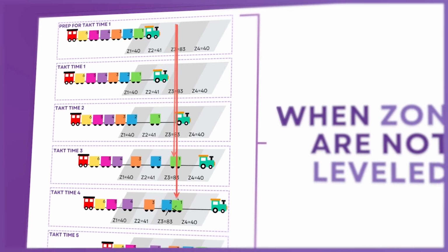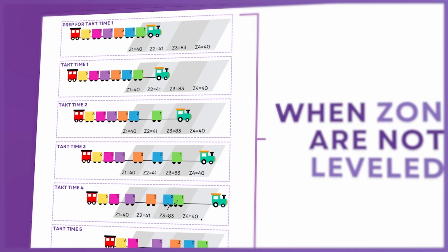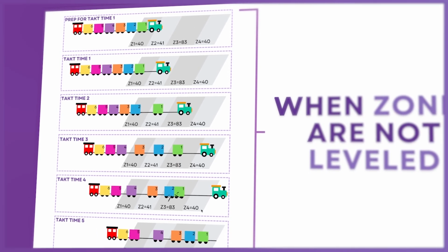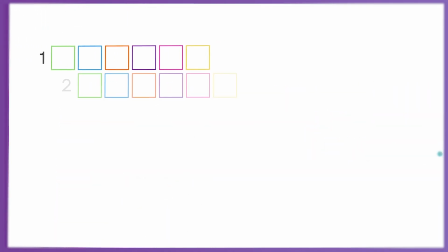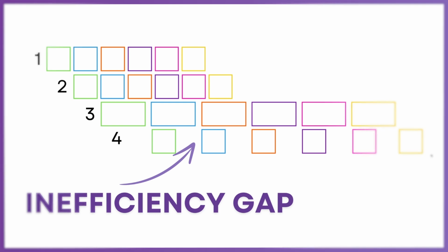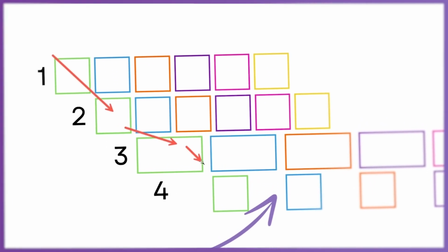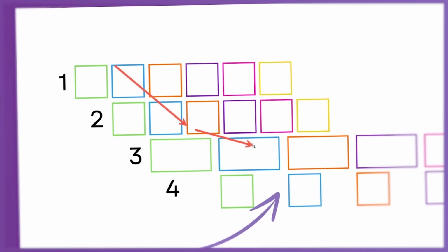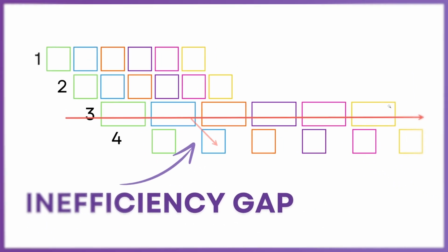But when you go to the fourth, it doesn't move on, and you have this bottleneck. You have this crash of the activity or the wagon because there's more work in that zone, and we have a zone bottleneck, and that's a problem. Let me show you what it actually looks like on a takt plan and why I think takt planning is so superior to other systems. You see normal flow, and then you're like, oh, wait, it has an interruption, but it doesn't do that just on one, right? It does that on all of them, which means that this zone is a problem. We have a zone bottleneck, and that's definitely one of the driving components.